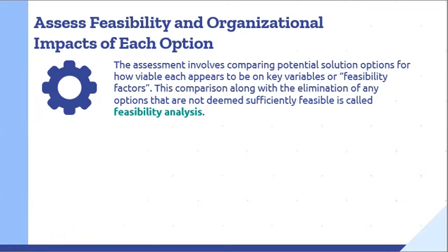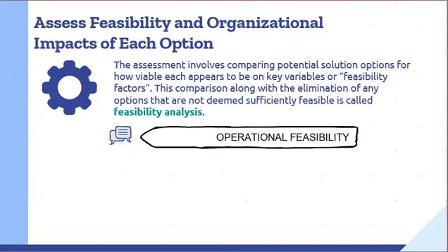So another reason for analyzing the feasibility of alternatives is to reserve the often painstaking work of cost-benefit analysis for only the most feasible option. The type of feasibility analysis described here is not a full business case in that the latter includes a complete economic analysis. Performing a complete business case only for the most viable options will save valuable time.